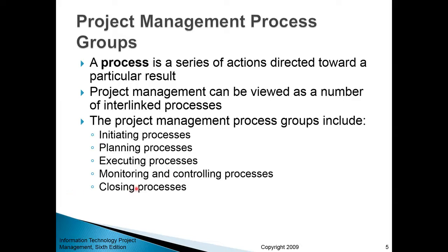And then you have the closing phase, or closing processes. It's related to formally delivering the project, meaning the specific product or service that the project was supposed to deliver, and also learning from what went well and what went wrong throughout the project. A lot of consultants and project managers skip the closing phase, because once the project is formally over, so is their contract, and they switch to another task or project. Typically there's just not enough time to do proper analysis and proper closing.